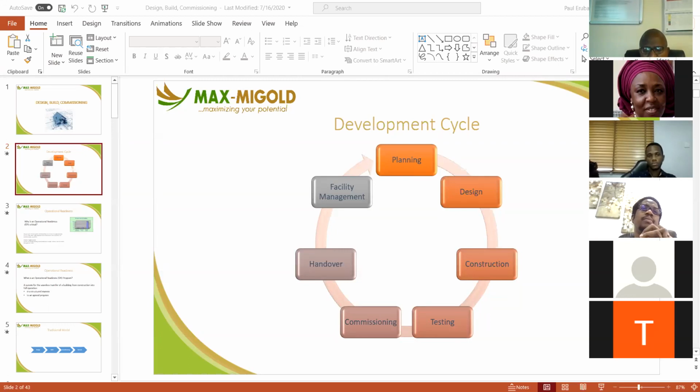So why would it be different, since the first two are supposed to lead to the third one? Exactly. The expectation is that if the design drawing was well accounted for in the construction drawing, the relationship will be established. And if you document every change adequately during construction, the as-built drawing and construction drawing will not be much different. It would mean you have accounted very well, but the reality on the ground is that variations are not documented accurately.